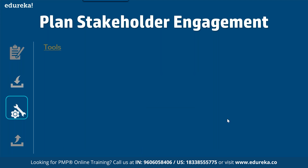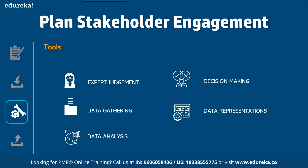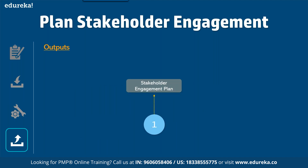The tools for plan stakeholder management are similar to what we saw before: expert judgment, data gathering, data analysis, decision making, data representation, and meetings. The output for this process is the stakeholder engagement plan — that is the only output produced in this case.